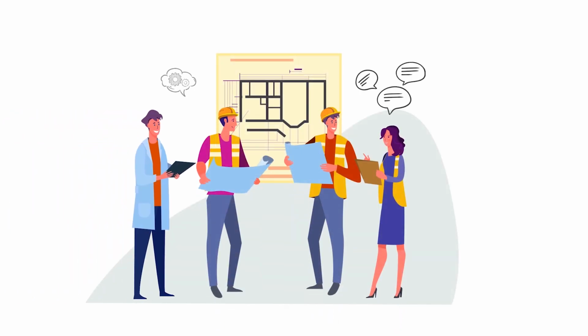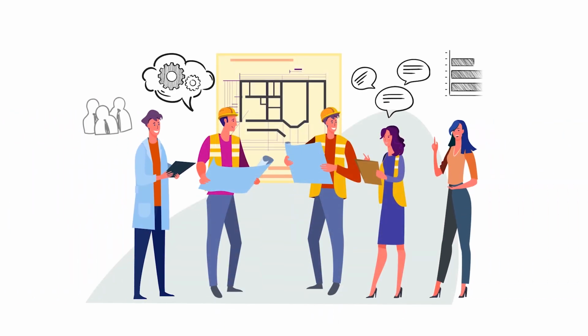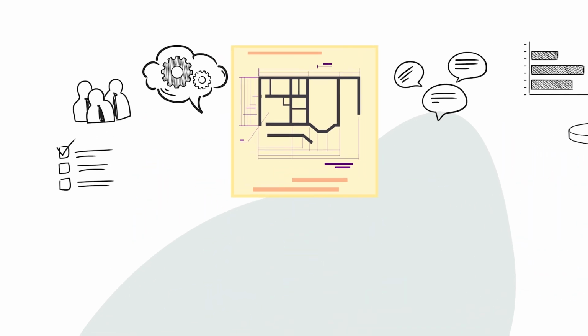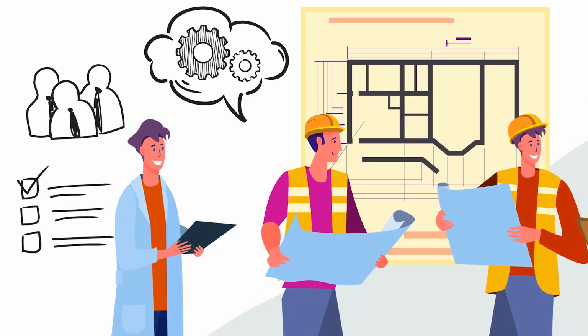Weekly work plan involves consistent communication and collaboration among stakeholders. During these discussions, the project team should also track their schedule. Is there any unavoidable adjustment from the schedule? Are there any constraints hindering the work? Or how should they get back on track?